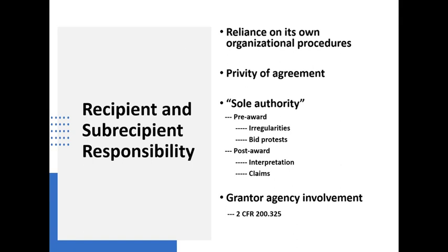Once you've placed the purchase order or contract, then you are also the sole authority for dealing with post-award matters, such as interpreting the terms and conditions of the contract and dealing with any claims that may arise from the contractor with respect to being paid or having remedies related to whether the contract has been breached.